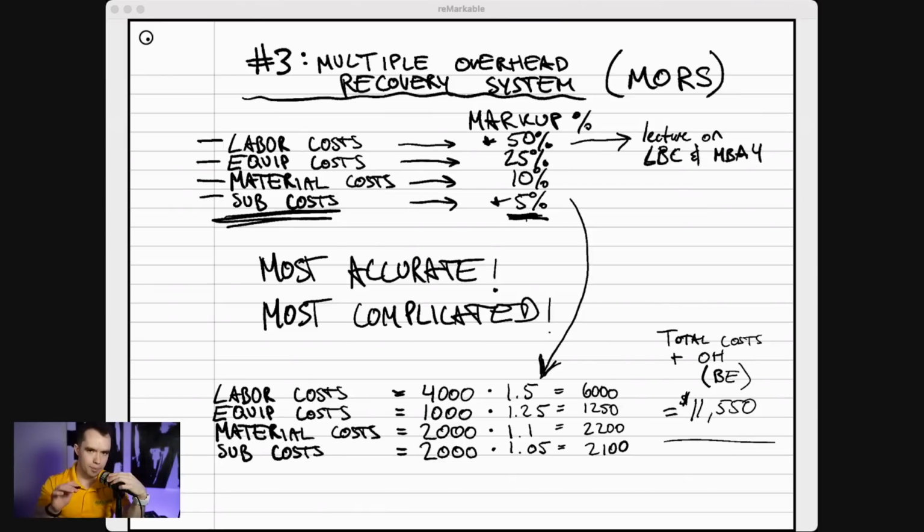It's also the most complicated because these numbers are kind of like the standards for the industry that I gave you here, but they aren't accurate for everyone. And again, the percentage of overhead on every single service might be different. For example, fertilization and weed control might not take hardly any sort of overhead from the office because you just send them on a year-long package. You pre-sell at the beginning of the year. You never have complaints. You don't have to manage anyone. You send the person out there. They have 300 clients and they just go for it. Versus mowing, where you've got to start and stop at the beginning and end of the season. You have to bill them every single month, and you have more churn, more training. There's more complaints, more customers saying more things back.